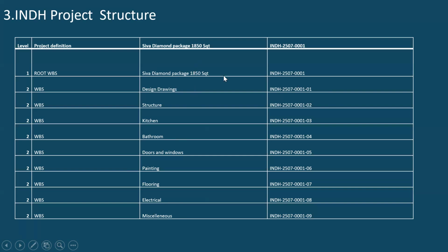That means in the sales order, we have to assign that particular WBS element which is ticked as a billing element. For example, if you want to bill separately for the design drawings, you need to tick this as a billing element and you can enter the WBS element. But generally, when we take the root WBS element as a billing element, we will be able to do the result analysis at this level and capture the cost, everything. The cost incurred from the lower levels, such as design drawings completion, up to the root level will be accumulated at this level, and we will be able to do the billing at this level, so that the cost and revenue accumulate here and we can run the result analysis. Mostly we use the root WBS element only for settlement, result analysis and billing purposes.